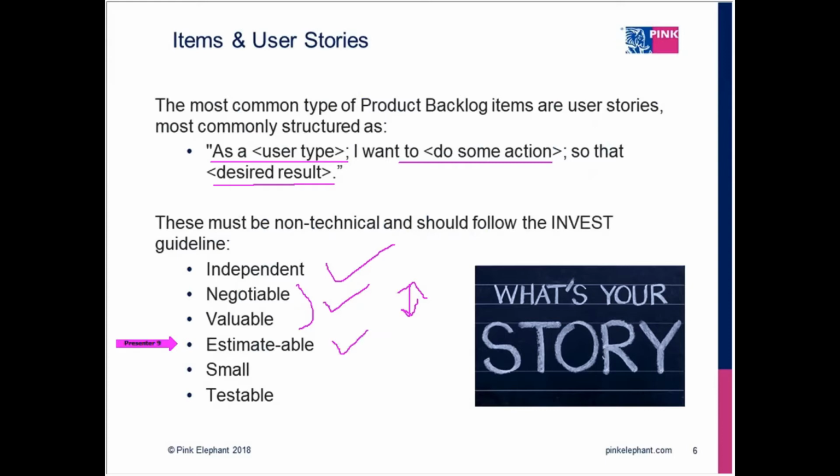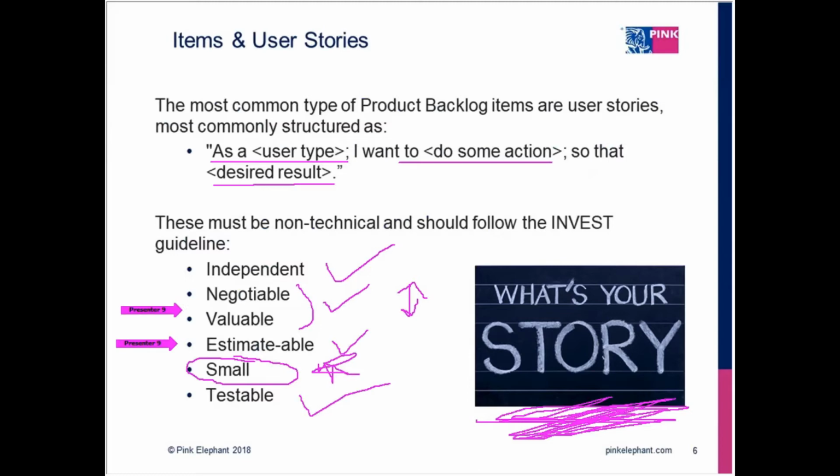And as much as possible, as things float to the top of the product backlog, make them as small as possible. And everything needs good quality, so that it needs to be testable as well. So this is our story. We want to fill that product backlog with just enough information to be able to come up with priority of unique independent tasks that can be prioritized based on value, and then broken down to their smallest component.